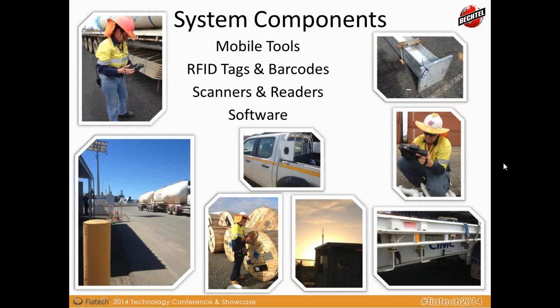At the moment there's about 100,000 individual components that have been managed to date, and that's largely because of the reprogrammable nature of the tags. Once they're installed, we can actually reuse them for other purposes. There's an interesting twist on that: with the extension of RFID life in the future, we could actually afford to leave the tags in place and they become part of a slightly more advanced operations and maintenance construct. We're thinking a little bit about that in the future, but typically at the moment the expected operating life of the final facility by far exceeds the life of the current RFID capabilities. So just something to think about for the future.